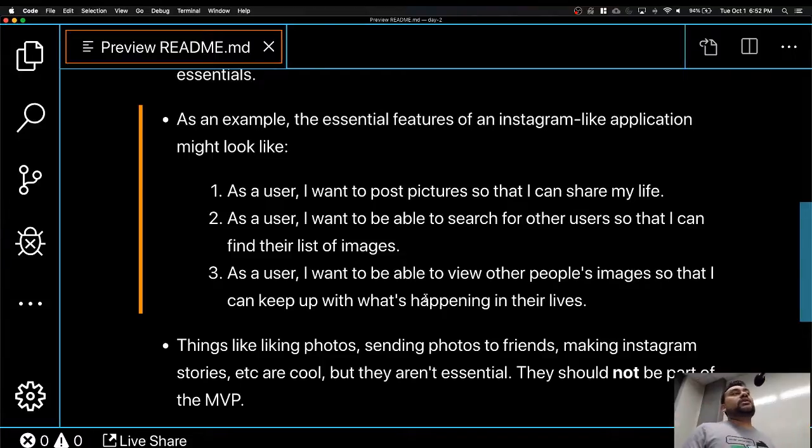Designing the page, if you guys are designing it. Research can also be a user story. For example, for the backend team, as a developer or as a backend team member, pick a persona, it doesn't matter, I want to research this API so that my team can use the data from that API.